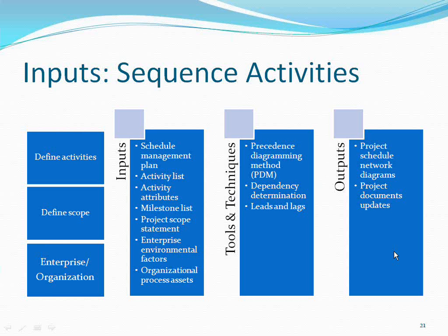So if you are starting on the 5th day, 5th and 6th, you will have 2 days lead. In an activity which is taking 6 days, you have started activity B on the 5th day. So 2 days is the lead time. Lag is waiting time. Like after foundation, I told you, you have to wait for 10 days. Till that time you cannot start any other activity. That is called lag time.